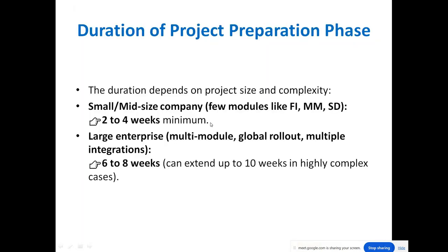Now, what is the duration of the project preparation phase? The duration depends upon project size and complexity. In the sense, it depends upon project to project, company to company. For example, if it is a small or mid-sized company and you are just going to implement only FI, SD, then it will take some 2 to 4 weeks. But as per my experience, it will take at least 4 weeks, not 2 weeks. In 2 weeks we cannot do. Even if it is a small project, at least 4 weeks are required.